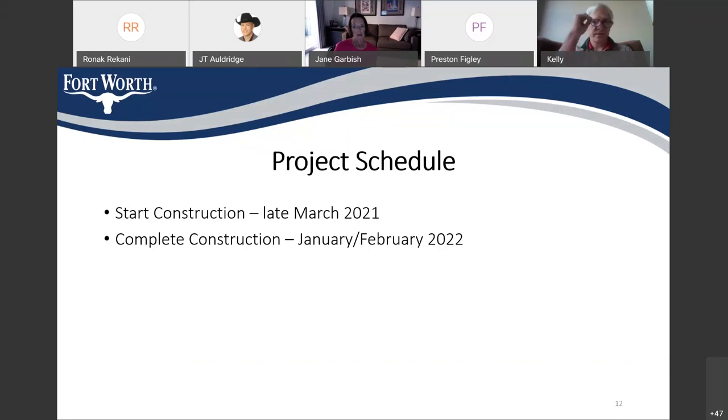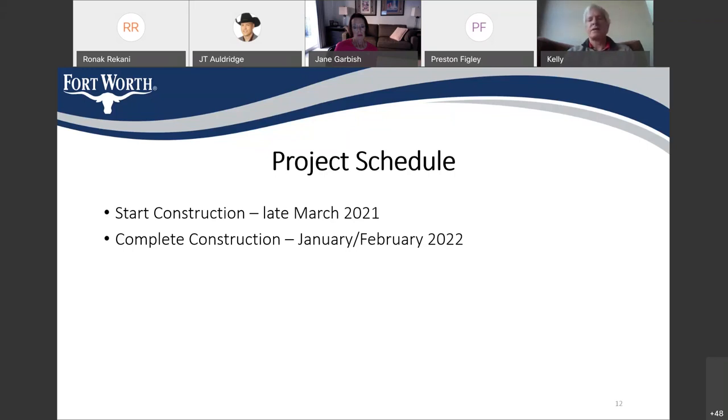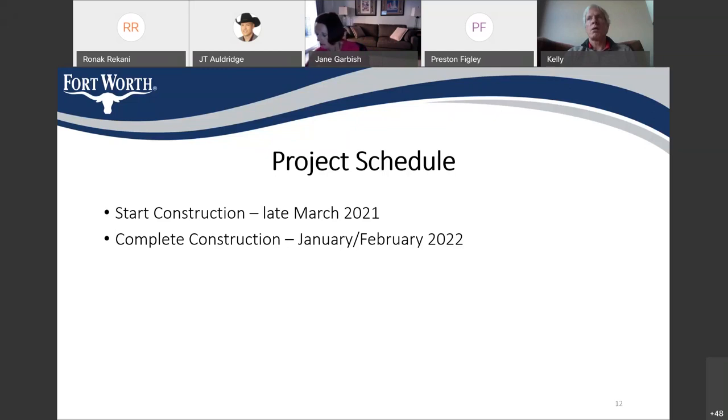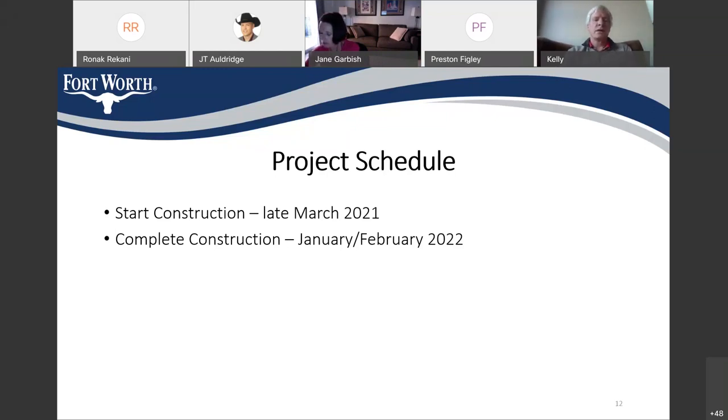The project schedule, we expect construction duration to be about 300 calendar days. We anticipate to start in late March 2021, but that will be pending the reopening of the White Settlement Bridge. The White Settlement Bridge is serving as a relief corridor into downtown during construction of West 7th. And it's currently in construction right now. And this project cannot begin until the White Settlement Bridge opens. So, we're anticipating and expecting the White Settlement Bridge to be open in late March. That way, we can begin construction in late March. And that way, it'll put us at completing construction about January or February of 2022.